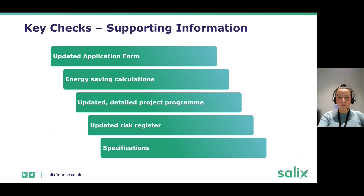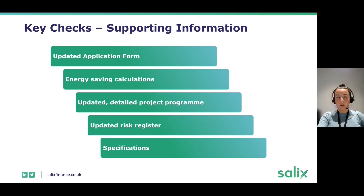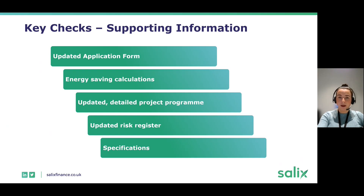An updated detailed project programme and risk register are important for us to understand what stage the project is at and any additional risks these measures might introduce. It's also important that we have reassurance you're still planning to complete the project by March 2023. Any product specifications you have will be useful — providing them early means one less thing to do at the completions stage and gives us confidence in the project design.